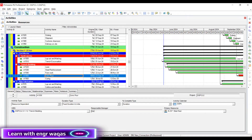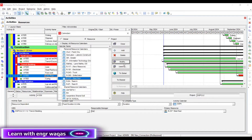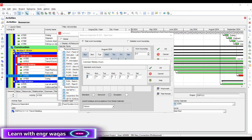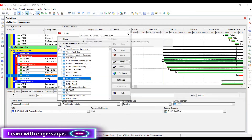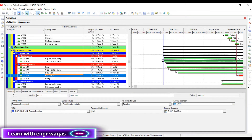If I change again — go to Enterprise, same way, Calendar — I can find it, Modify, and make the work week. Now this resource is available for all days, only Saturday and Sunday off. Close, then Schedule. Now it is 163 days — that's the difference. So these kinds of resource dependent activities will always be required on certain kinds of projects, like maintenance projects where the project is resource driven, not plan driven.